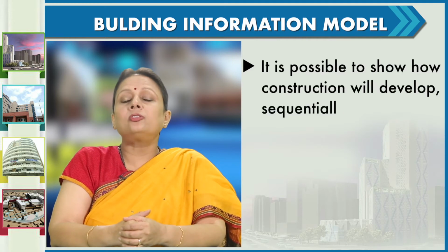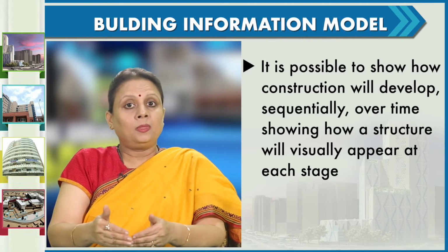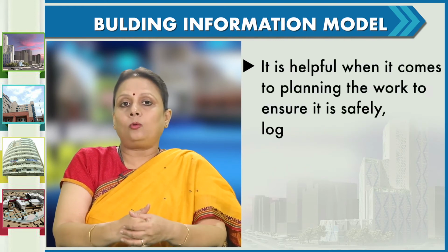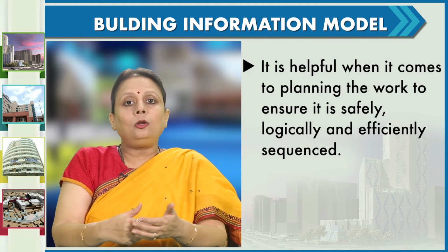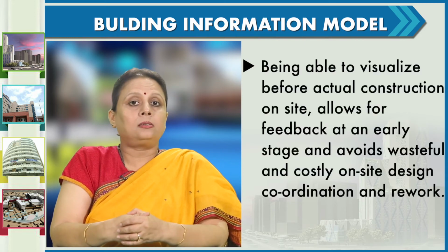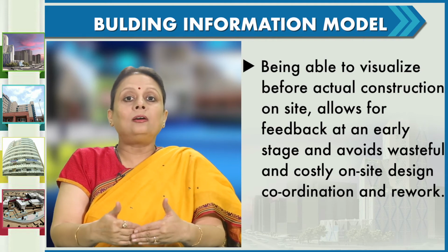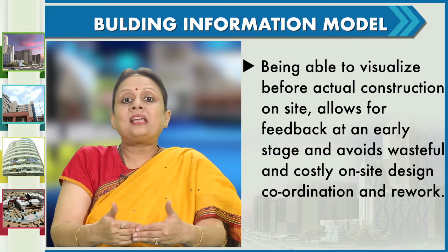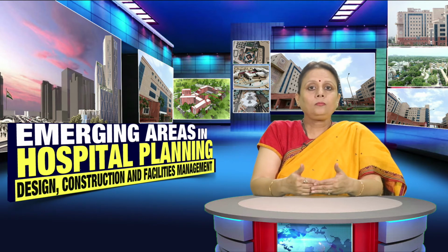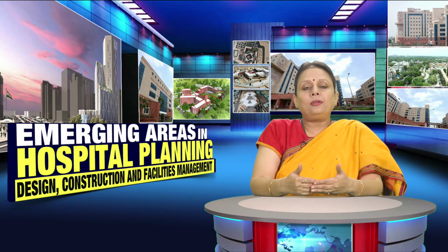It is possible to show how construction will develop sequentially over time, showing how a structure will visually appear at each stage. It is helpful when it comes to planning the work to ensure it is safely, logically and efficiently sequenced. Being able to visualize before actual construction on site allows for feedback at an early stage and avoids wasteful and costly on-site design coordination and rework. As you can see in the video, showing how projects will be constructed visually is also handy when engaging with stakeholders, giving everyone a clear visual understanding of planned works and what the finished construction will look like with no surprises.